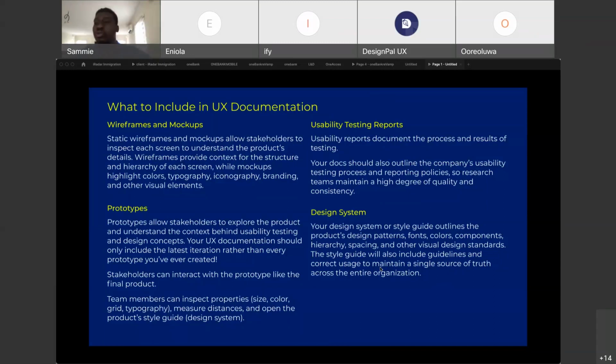They are unable to manage, and this is coming from personal experience. I don't know if that's the same thing you experience. A lot of Nigerian stakeholders can't make a decision when they see the full design. So there are ways to handle that. So what you do is you run sprints for each feature. So you cannot build the entire app completely because you delay your stakeholders, but you can work on a feature.